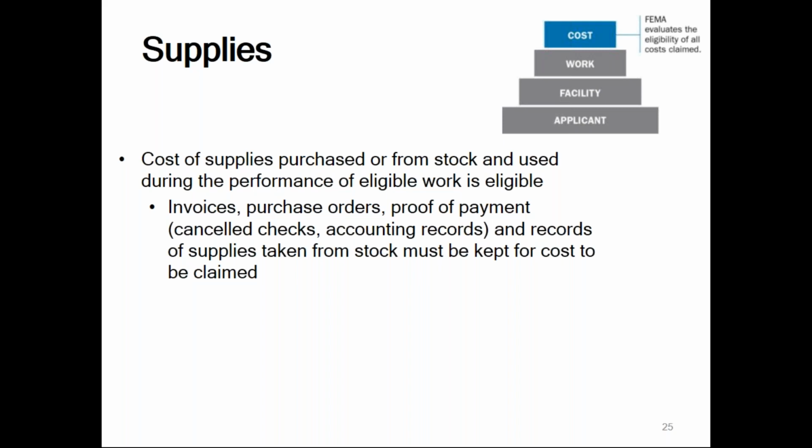You may also be taking stock directly from your stockpile. If that occurs, we will be asking you for records that you have in place identifying your stock. You can be reimbursed for the cost either to replace that item for what you paid for it, or for what it will cost today to replenish that stock item. Either one, it's your choice.